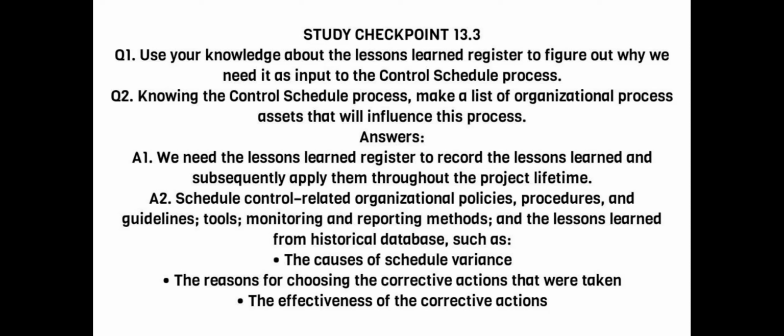Answers. A1. We need the lessons learned register to record the lessons learned and subsequently apply them throughout the project lifetime. A2. Schedule control related organizational policies, procedures, and guidelines, tools, monitoring and reporting methods, and the lessons learned from historical database, such as the causes of schedule variance, the reasons for choosing the corrective actions that were taken, the effectiveness of the corrective actions.